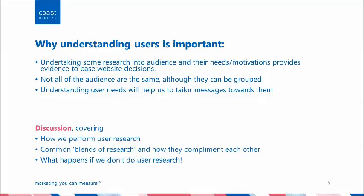So we've done that in the past, and our aim really is to have someone that we might interview before the specification part of the project, get their insights, especially someone good to speak to who gives us a lot of insight. And then at a later date, once we've got a prototype that we might want to test with them, we can take it back to them and interview them about the prototype. It adds a richness to that process and allows us to start testing with users early, and the same users as well, because they've engaged with us three or four times by that point. Typically, the insight we're getting at that level is much higher.